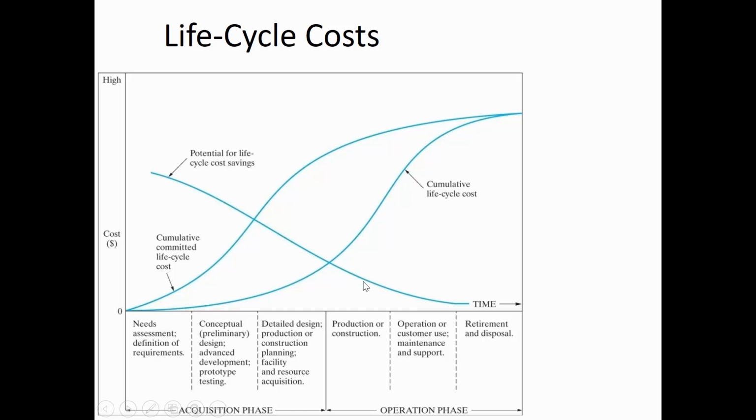So if we already decided on a 3-story building that's going to have tons of features, and once it's being constructed, there aren't very many decisions that you can make at this point to save money, because the sizing and the contents of the building and how it's going to be used, all that's already been figured out. And so it's tough to pinch pennies at the end of a project because so many commitments have already been made.